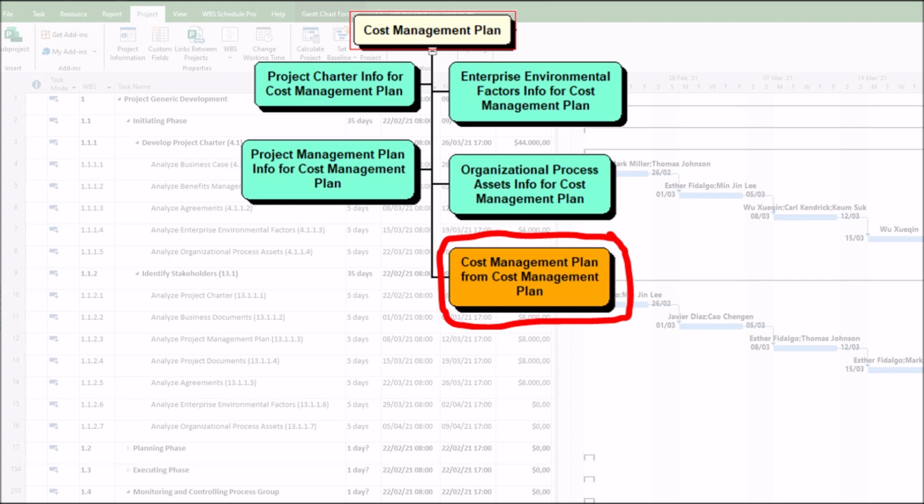To avoid this, project managers must ensure, first, accurate estimation techniques, such as bottom-up and parametric. Second, clear cost control mechanisms, such as EVM and thresholds. Third, proper risk reserves, such as contingency buffers. Fourth, stakeholder-aligned reporting. As a final message, the cost management plan is essential because it provides the structured approach needed to manage project finances effectively.